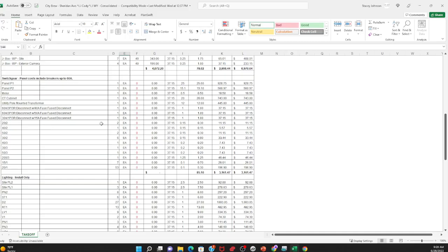So these numbers, we get by counting from the panel schedule. We just went to the panel schedule and counted. I thought that once I sent the panels to the supplier, they would do all the counting. But my electricians say no, count it separately, because sometimes they're wrong. So I'm like, oh, okay. So we count that because for each of the breakers, there's an amount of time it takes to install each one into the panel.